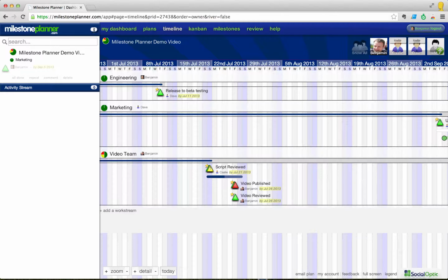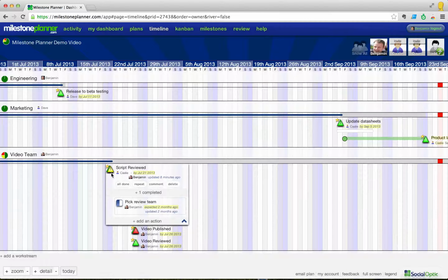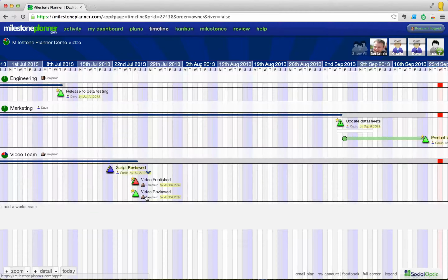So I'm going to go ahead and slide off the history panel there because I don't need the history right now. So we can see that I'm quite far back from today in my plan here. So I'm going to bring this up to date. I've got a milestone about a script, so I can pop that open, have a look at that, pick the review team. Well, yeah, we did that, and we actually reviewed the script, so I'm going to go ahead and mark that done. Now these two other milestones, however, they're not already done, so I can actually drag the work indicator.